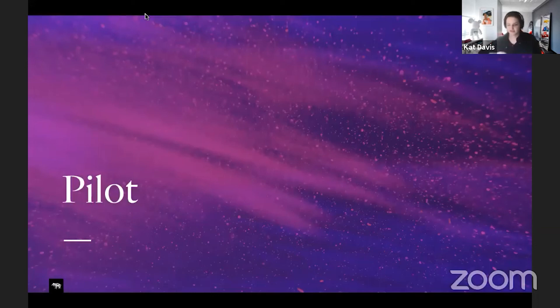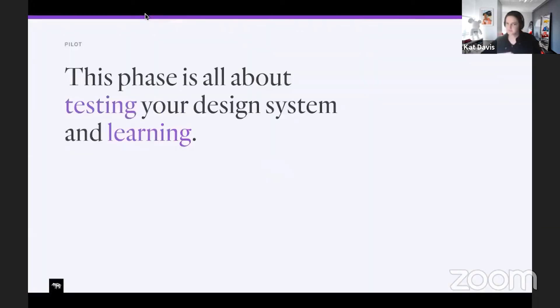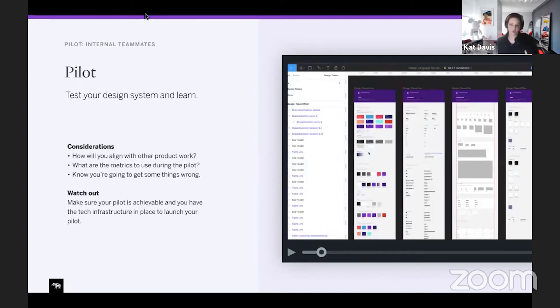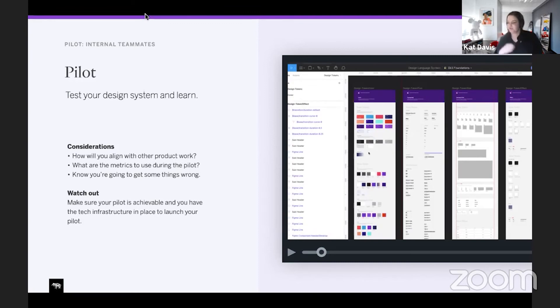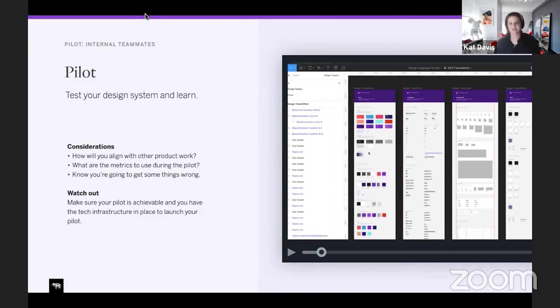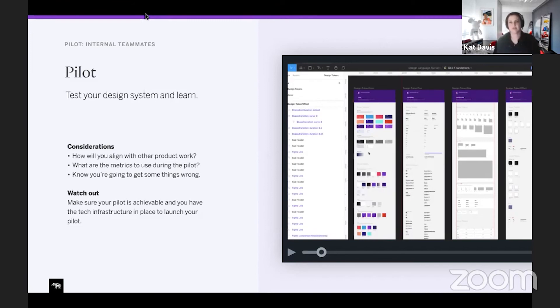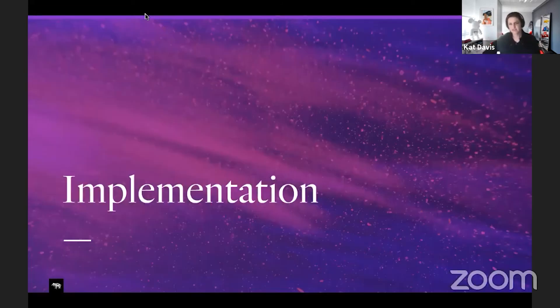Next phase is our pilot phase. This is all about testing your design system and learning. You're not going to get it right the first time. So really important that you're able to test your workflows. How are design and engineering working together? Are we naming everything right? Do you do your linting? How's everything working? What's going wrong? In a recent pilot, we had trouble onboarding people to our system. We created these really short two minute videos after the pilot so that people could get the system better. That was a really quick learning that we had that really improved the success of the pilot and the second phase and then implementation.